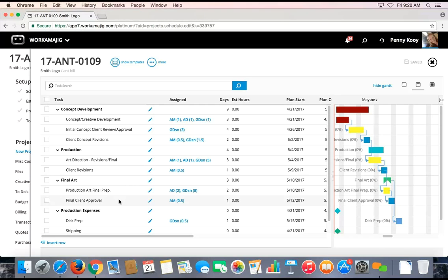Two things to mention about project schedules in Workamajig. First, schedules will default to skipping weekends for project planning, since we typically don't plan to work on weekends. If there's ever a need to actually plan for weekend work, you can always overwrite that default, but that's typically not the standard.